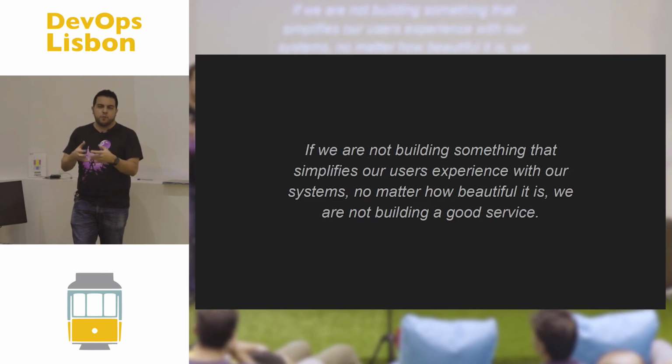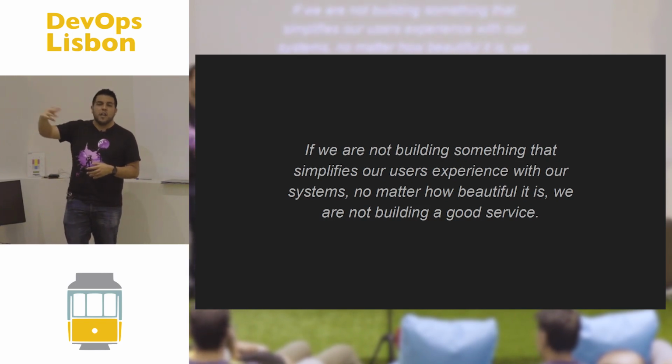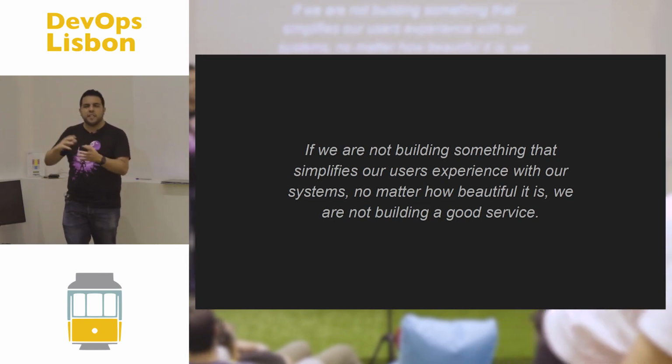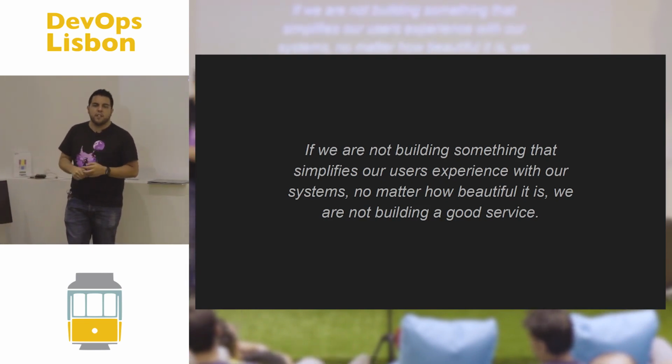We basically go to those people and say, try it. And we normally do trials by team. So we organize with the release management team and so on, and say, you have teams to try this, please, or the project management team, and they get 3, 2, 5, and they try it, they give feedback, and if everything is okay, it rolls out. If it doesn't, we go back and draw it a little.